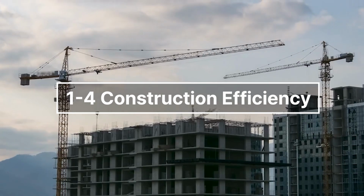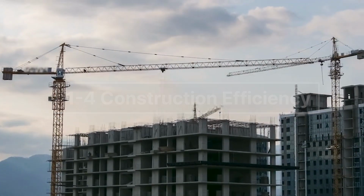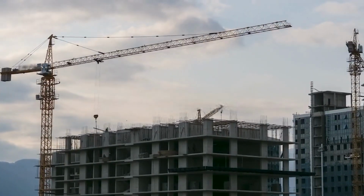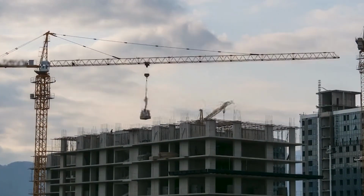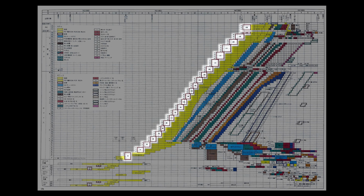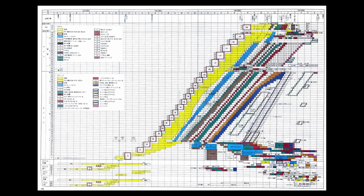Fourth, it was for construction efficiency. Crane operation was limited, especially in the upper floors where constraints were even greater. Each floor contained over 200 columns, girders, and beams. The 3-story structural stacking allowed each floor to have its own process, creating a construction cycle.